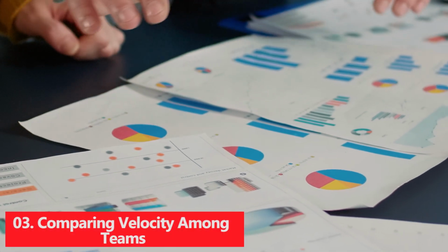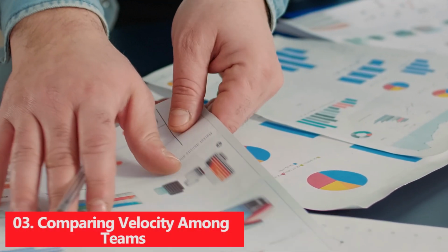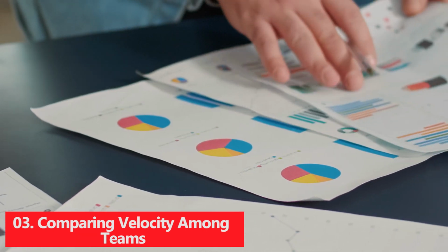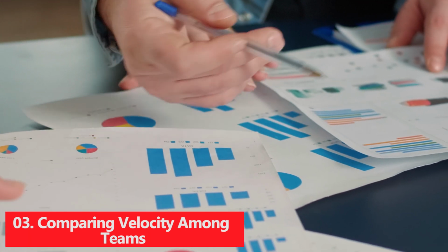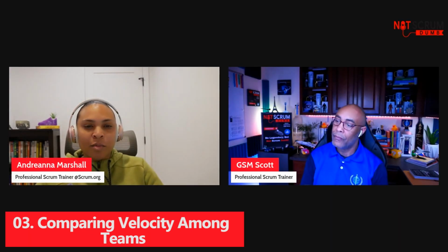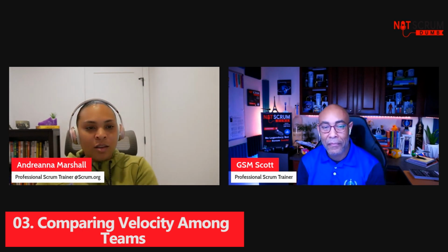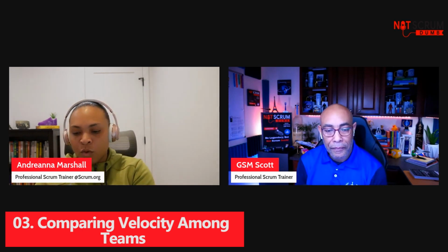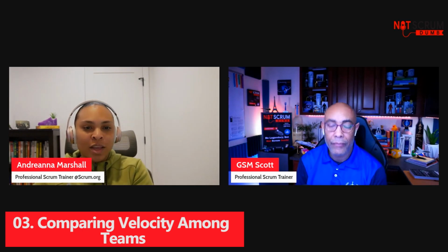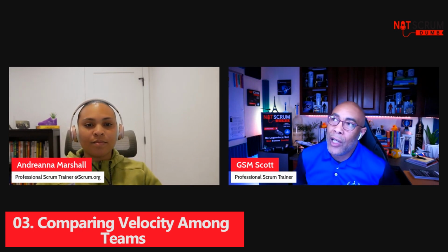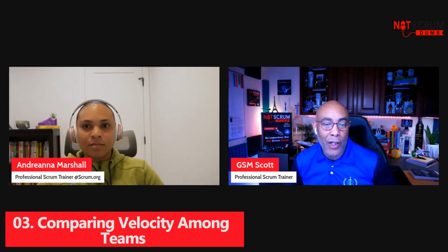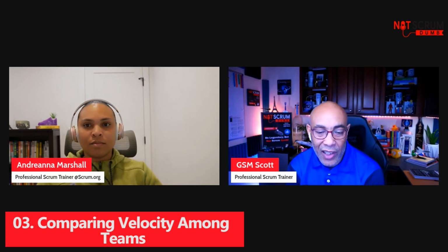Yeah, I think that's a great one, and that takes us to the last one that we have for this video, which is comparing velocity among teams. These are arbitrary numbers that just are indicating what a team is able to do for that sprint. It does not indicate success. There's no way to compare because teams are different. How they use story points or whatever other measure they're using doesn't really make any sense when you're comparing to another team. Yeah, I'm thinking about the new person that may be tuning in to Scrum, maybe hearing about velocity for the first time and maybe a little lost.